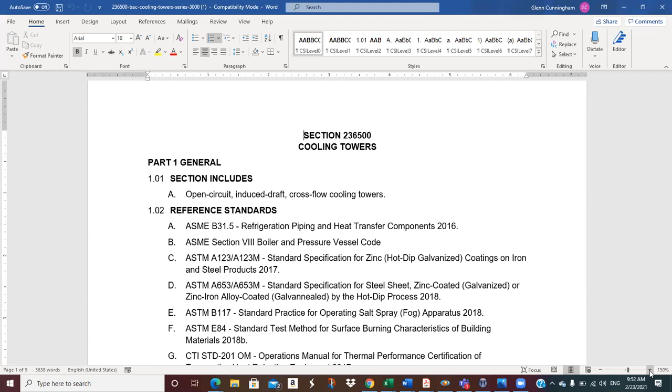And when a big problem arises, and I've been involved in a couple of jobs that had big problems, man, people are all over these spec books. And if it comes down to attorneys and depositions and all that stuff, you're back in that spec book saying, okay, what did we specify? What went in? Did what was actually installed meet formally the specifications? And if it didn't, then that comes up big time. Mr. Contractor, you did not meet specification D. You didn't meet the ASTM standard, and the thing fell down and killed somebody. You're in big trouble. So that's kind of the way this goes.